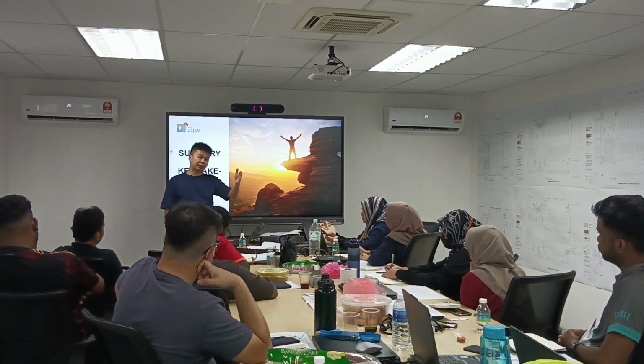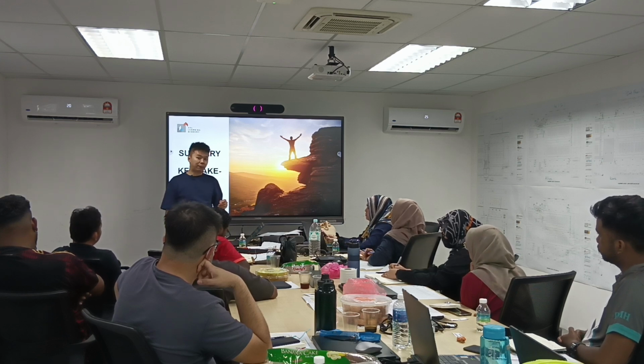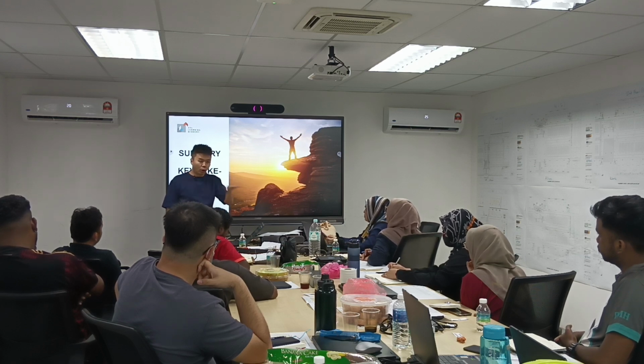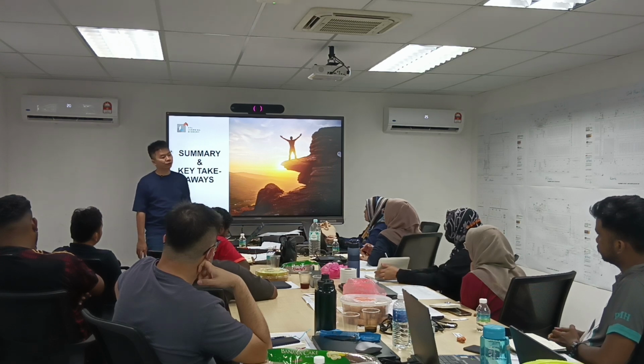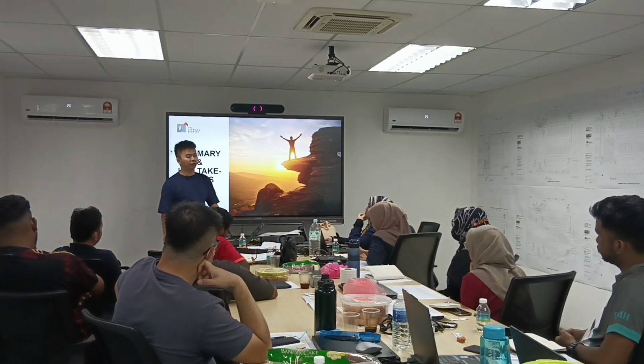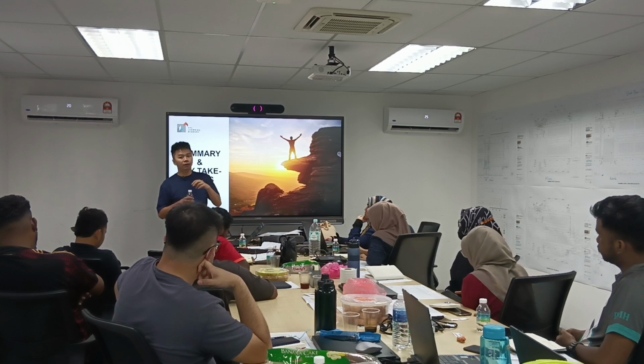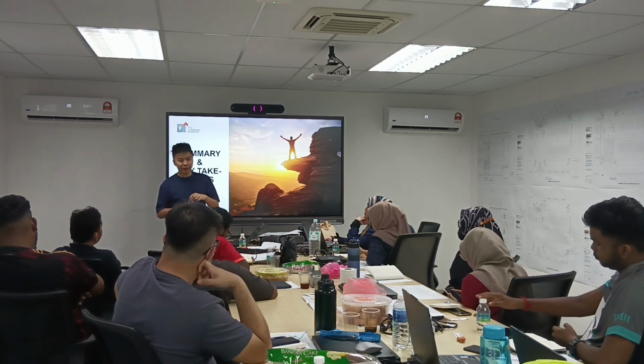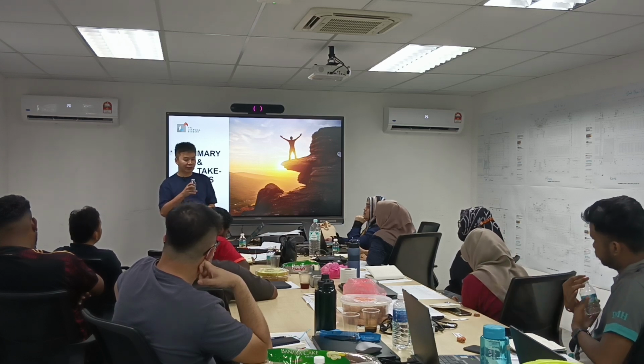So what it means is that after your CX level 2 complete, when you do CX level 3, you can actually do CCC already. Yeah. So if you manage it pretty well, like my previous project in my previous company, we do CCC in CX level 3. We will never do CCC in CX level 4 and 5 because it will obstruct your PNC. Then for CPC, we normally issue it together with ISD.